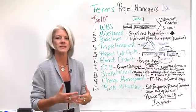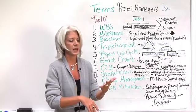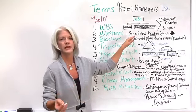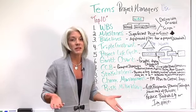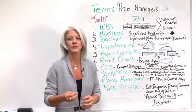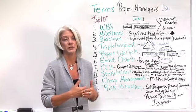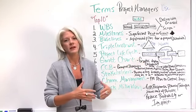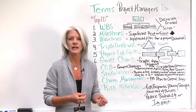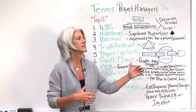During the project, of course, changes are always going to occur: changes to the time, the scope, the budget, and the quality. As long as you take those changes to a CCB, which we'll talk about later, to get approved, they're giving you approval to rebaseline the project. That's approval to make changes. So if your schedule is elongated, maybe it's delayed for some time, if you get the appropriate approval and rebaseline, to me that again is the difference between a failed or successful project.